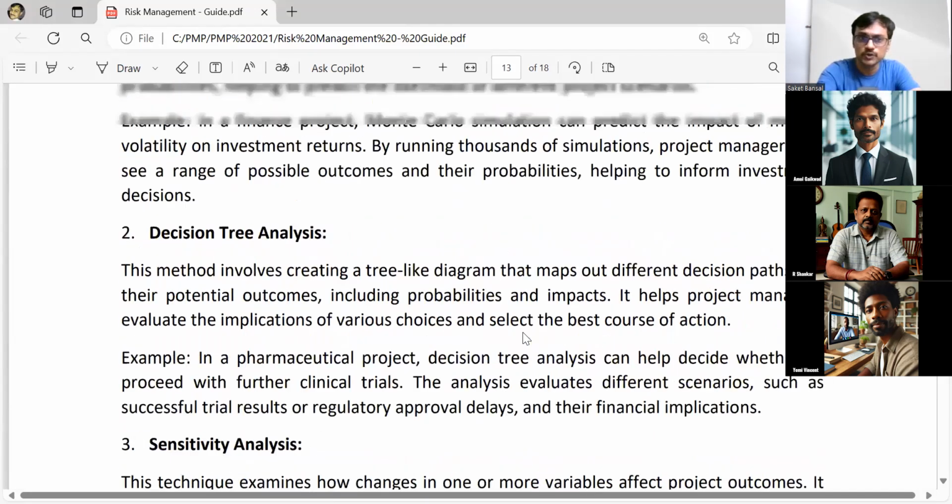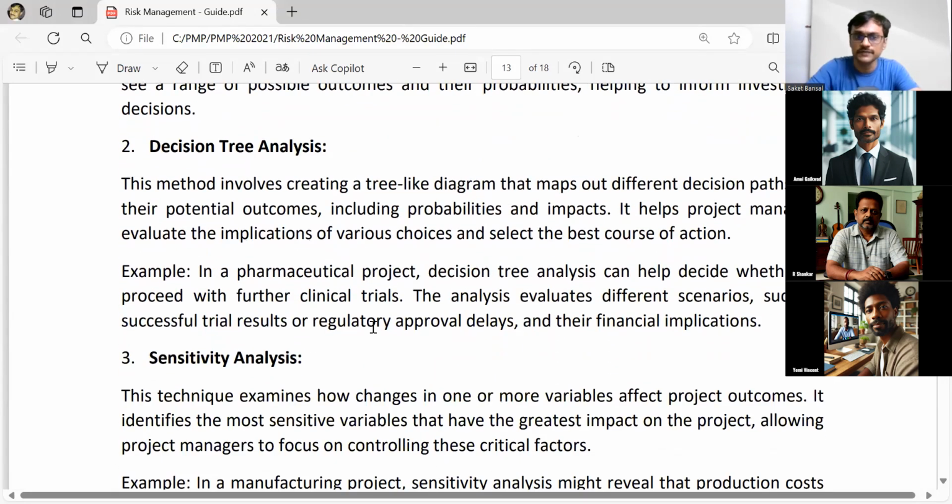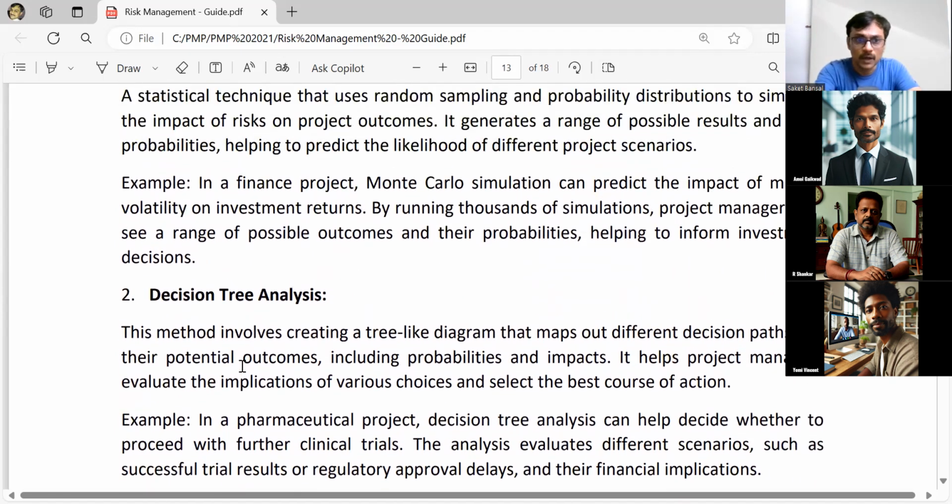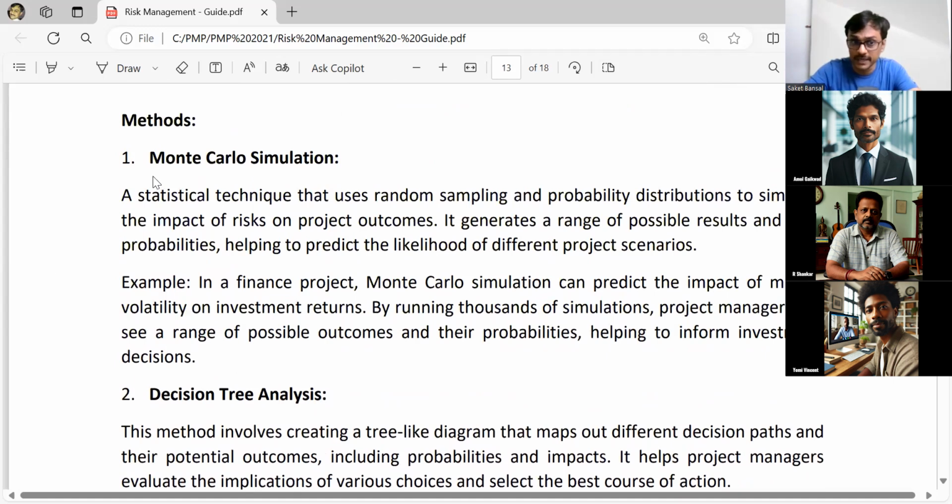So whatever I explain to you, simulation, we do it with the help of sensitivity analysis. So we can see how a particular variable will impact the other parts of the project. You can say how sensitive the project is to exchange rate, how sensitive the project is to delay. If we have a delay in monsoon, in the rainy season, what will be the impact on the project in a numerical manner? We can identify extended monsoon, short monsoon, long monsoon, all those kinds of scenarios, and come up with the project budget. So that's sensitivity analysis. Now, there is a special type of simulation. People usually get confused about it in the PMP exam: Monte Carlo simulation.